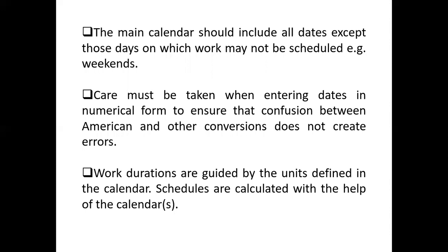Work durations are guided by units defined in the calendar, which should be clear as we look at the practical aspect of this. Schedules are calculated with the help of the calendar. So if we want to come up with a work schedule, we must set up a calendar that will suffice in your arrangement.